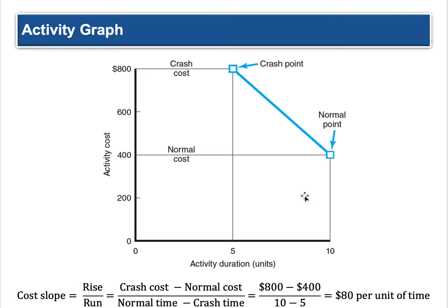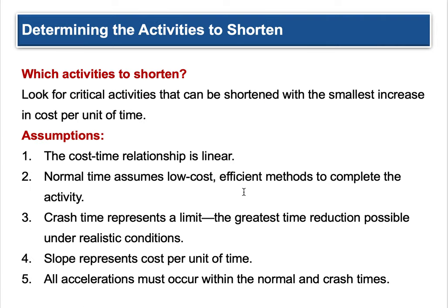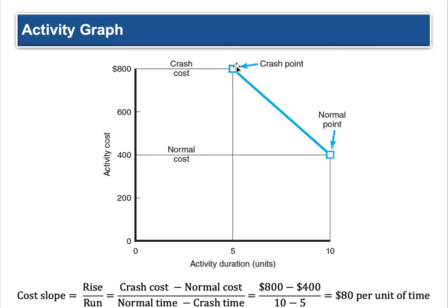Where do you want to be? Let's say in five more units — when we get to unit 10 — we could be down at the normal point if we do X, Y, Z. So you subtract where you are from where you want to be: $800 crash cost minus $400 normal cost equals $400. Divide that by the normal time — five units — and you get $80 per unit of time. That tells you how much you need to cut per activity. Every time you do something, it needs to be $80 less expensive.